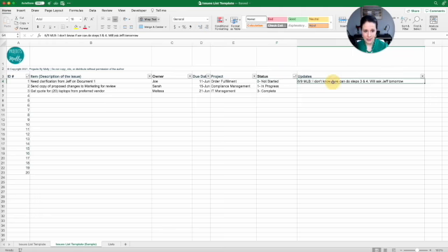And then we have an updates column. And this one, I really recommend a couple of best practices depending on what tool you're using. I think it's helpful to put in a date and your initials whenever you add an update so you can tell who did what. And then you want to add something that will be a good trigger to yourself so that you know exactly what the next step is. So here it's just, I don't know if we can do steps 3 and 4 in this particular document. I'll ask Jeff tomorrow. So just something that will trigger your mind. You don't want to have a whole paragraph of updates here because then your list is going to get very long.